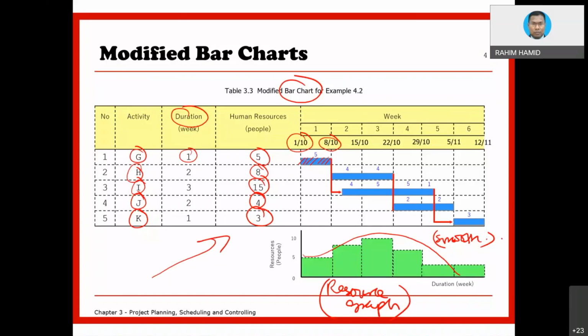Whatever we do is basically within the contract period. Normally you can complete the project maybe within 1.5 years, but then you spread things around in order to fit the time frame of 2 years, because you allow for some extra time, you never know.